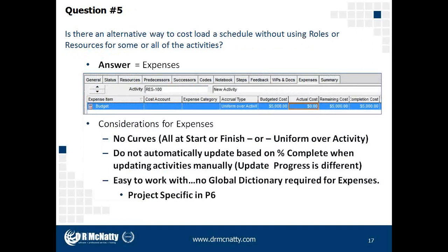Okay, question 5 asks, is there an alternative way to cost load a schedule without using roles or resources for some or all of the activities? And the answer to this would be yes, and it is the expenses tab. So the expenses are at the activity level, and a lot of organizations use and prefer the expenses. There's a certain ease of use to it. They are not required to have a dictionary that gets set up and assigned. They're fairly free form and fairly easy to work with.